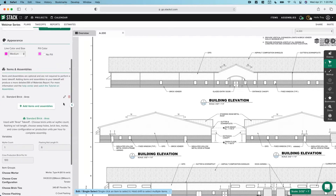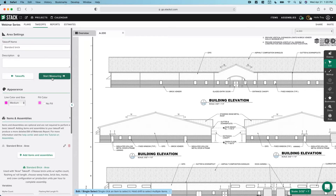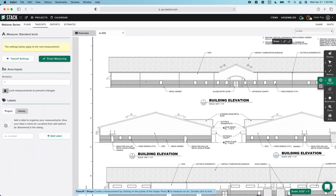At this point I've created my takeoff for standard brick, I've attached this assembly, and I've answered the specific questions about the standard brick we're going to measure. Now we're ready to roll — we can start measuring. In this case, though, I'm going to slow you down for a minute and we're going to set up some groupings. By default, if I do not set up any groupings in the labels section, our takeoff templates and reports are going to show everything in its totality.